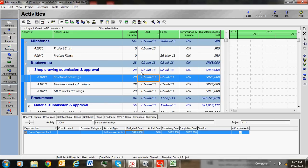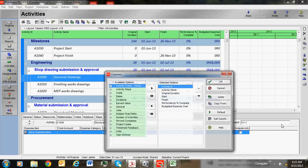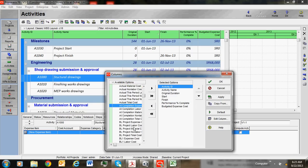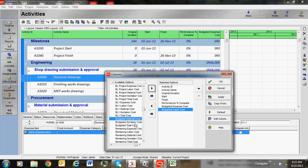This is our baseline program. Once you update this program we can get actual cost, Cost to Complete (CTC), Cost at Completion (CAC), and Budget at Completion (BAC). These can only be obtained after doing the update. Right now we can only see the expenses cost. If you want to show labor and non-labor cost also, you can show those columns - budgetary labor cost, non-labor cost, and material cost - just apply.